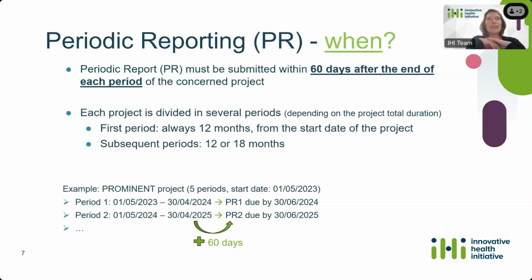So when is this periodic reporting needed? It must be submitted within 60 days after the end of each period of the concerned project.